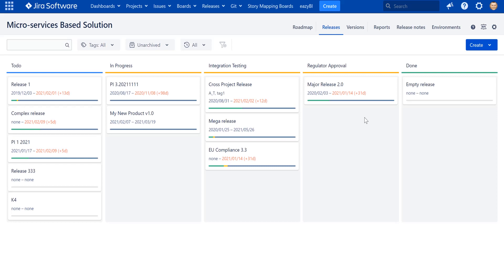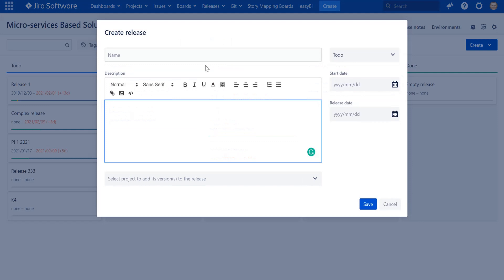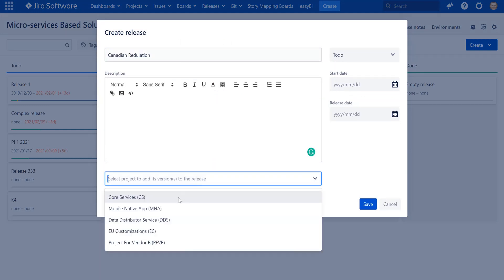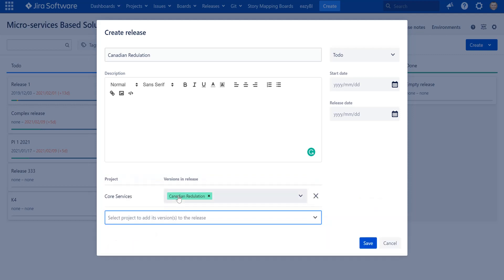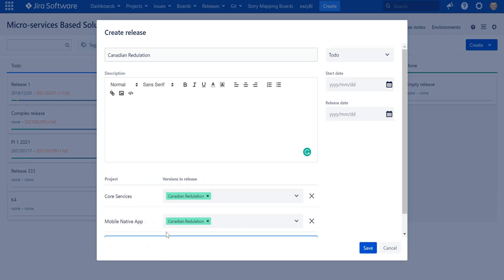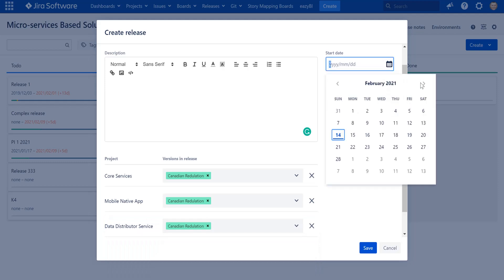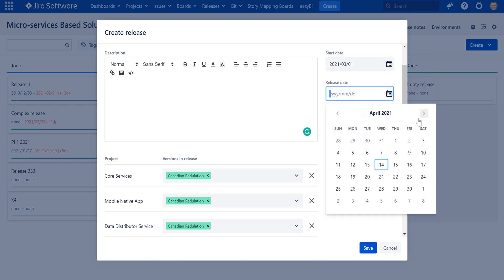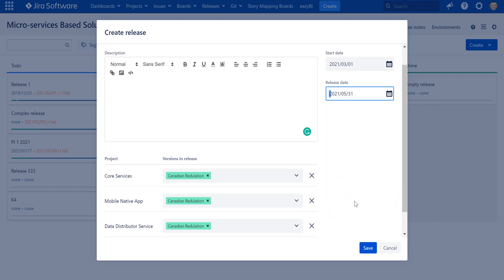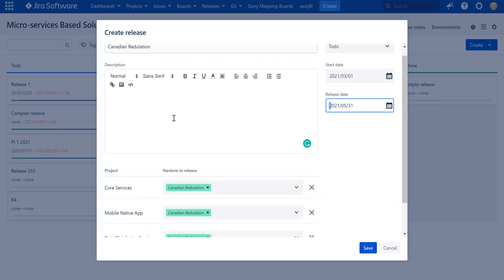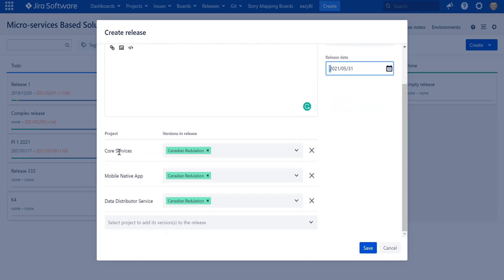Let's simulate the first case — planning a cross-project release. Imagine creating a new Canadian Regulation release, which requires work from Core Services, Mobile Native Application, and Data Distributor Service. I want to start at the beginning of March with a forecast to finish by end of May. I'm creating a release and defining the projects involved.